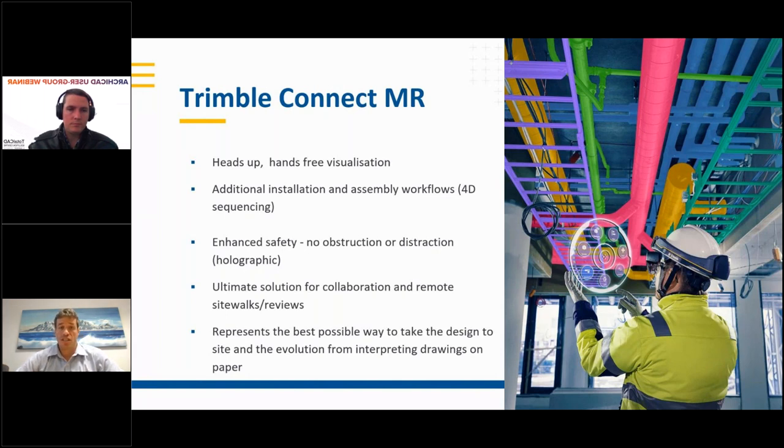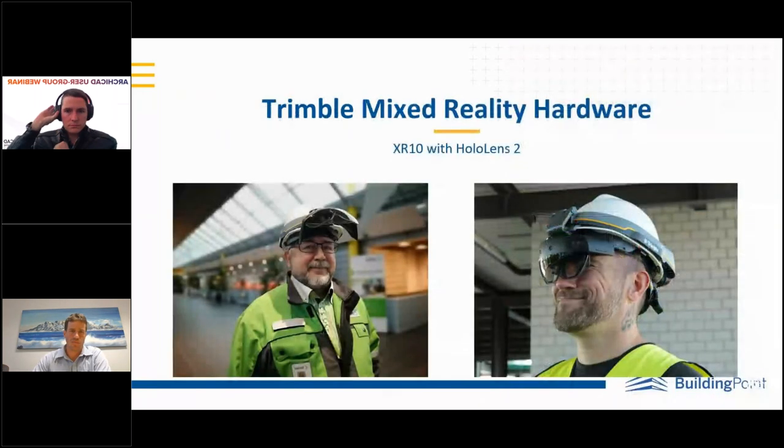It even has remote collaboration possibilities with this device, where things get really more exciting as the user experience can be captured as video or streamed live to offsite stakeholders. Being head mounted, the holographic display technology offers improved safety due to the user's vision not being distracted or obstructed, and offering additional use cases where work can be carried out simultaneously without the need to pause and go back to tablets or drawings or interpret what to do next. In fact, offsite assembly of prefabricated modules and components is where we've seen some really big wins with the use of this Trimble mixed reality, where you bring in 4D sequencing functionality of Trimble Connect, which means you can create a one-to-one scale step-by-step three-dimensional assembly guide and basically eliminating the opportunities for errors working with complex designs.